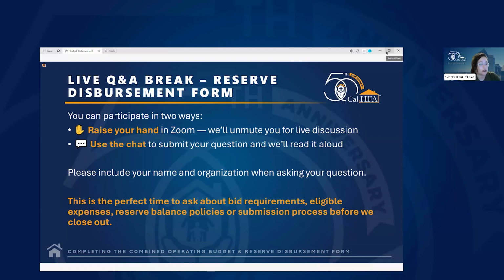And to clarify it just a little bit more, it's usually on the same invoice, so it means it happened at that same time. Per our guidelines and our policy, if the work is done by a single vendor and it's invoiced on one invoice and it's over that threshold, we have to have the bids required. Not if it was done like one week and then next week it's a totally different invoice, then that's different. But when it's invoiced at the same time, we have to abide by our policy and follow our bid thresholds.